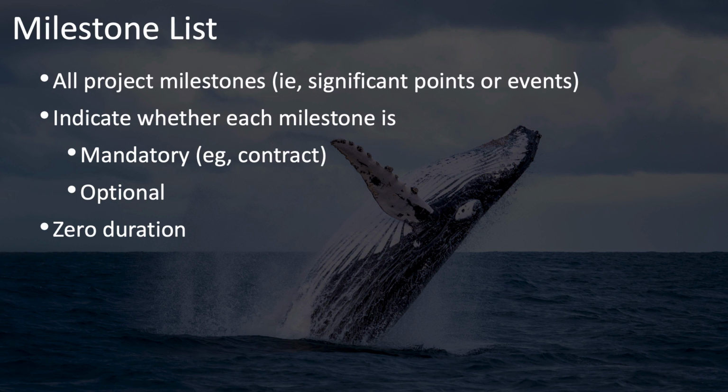You'll start this milestone list as you put together the project charter. But then once you're working on the project schedule in project planning, you'll want to use the milestones that were identified early on and recorded in the project charter as your starting point to develop the milestone list for your project schedule. This list of milestones may change. You may add more milestones and certainly rearrange some of the times of those that are not mandatory, based on what you learn as you develop the project schedule.